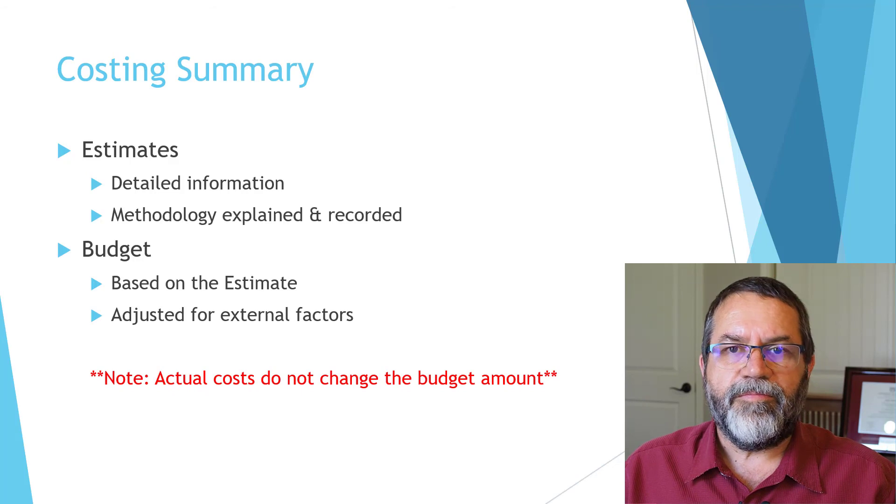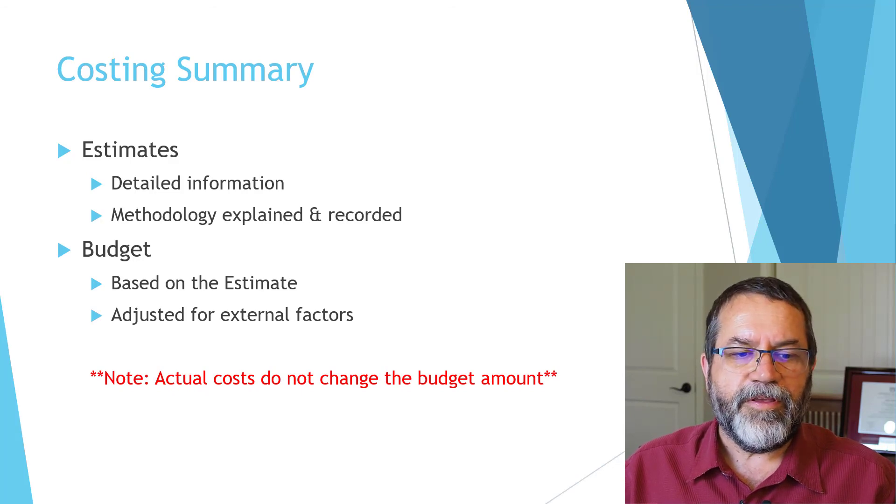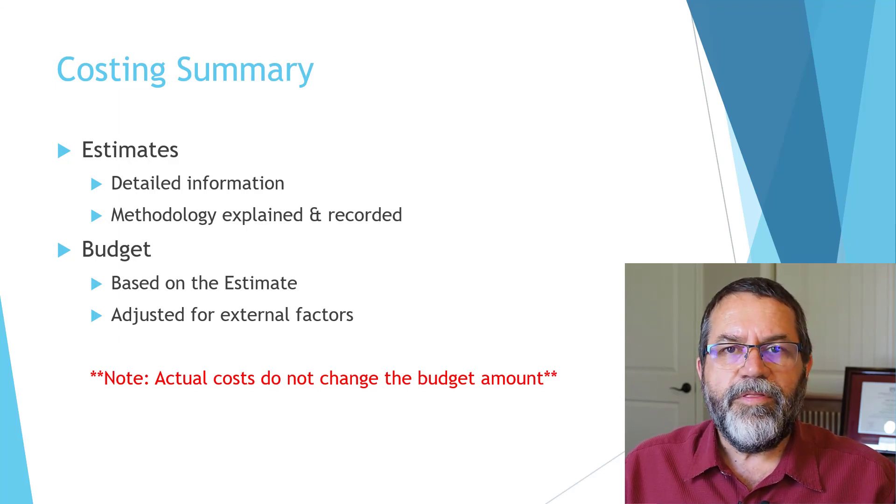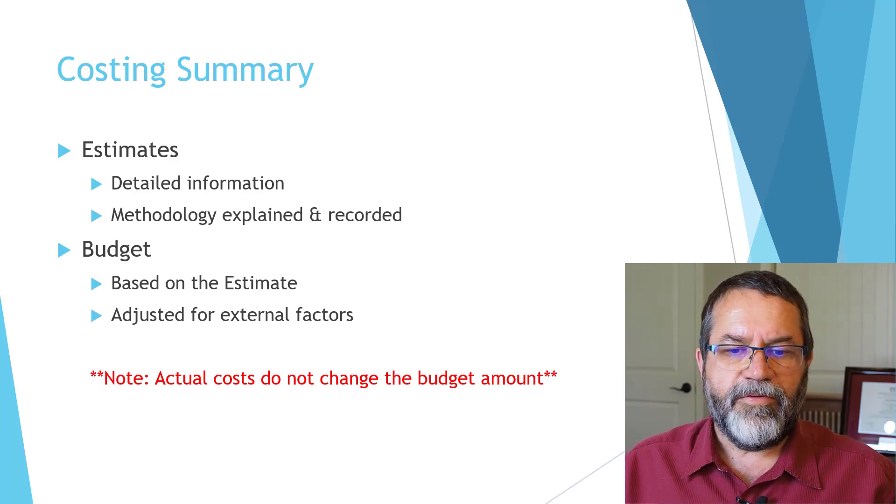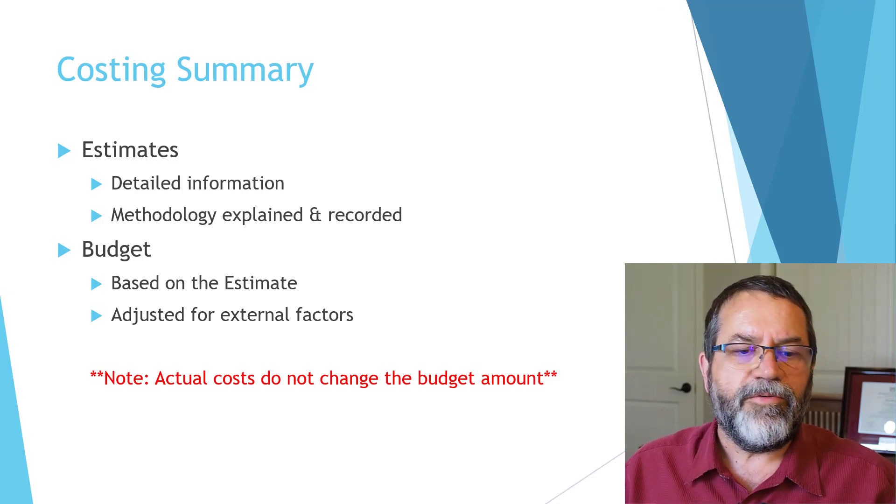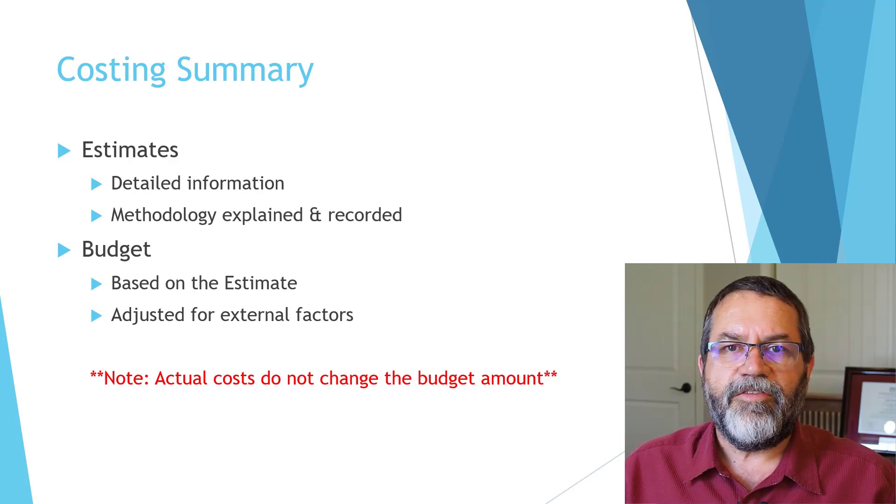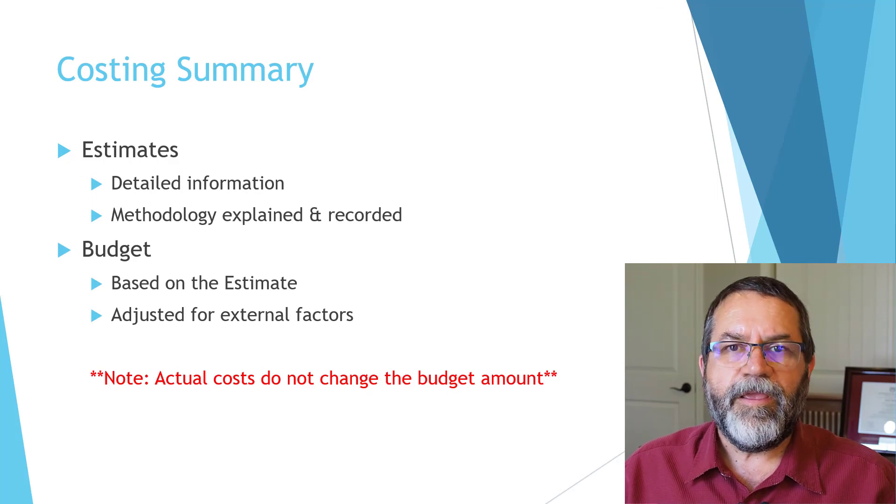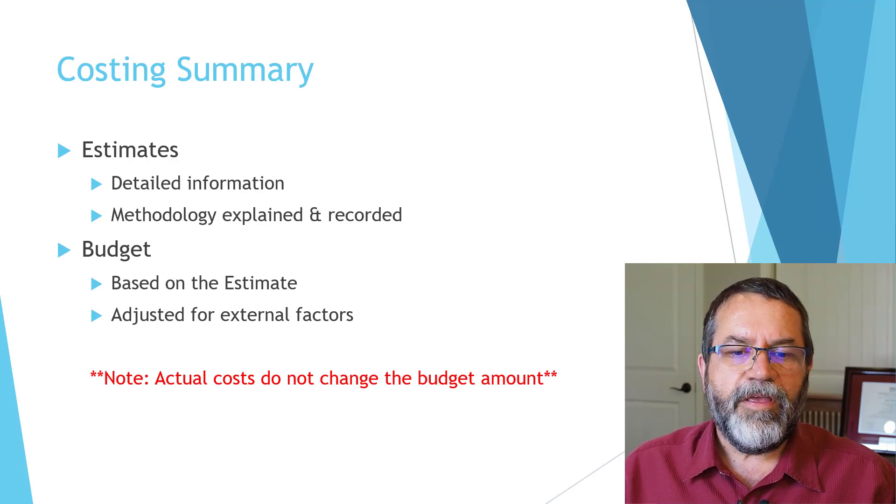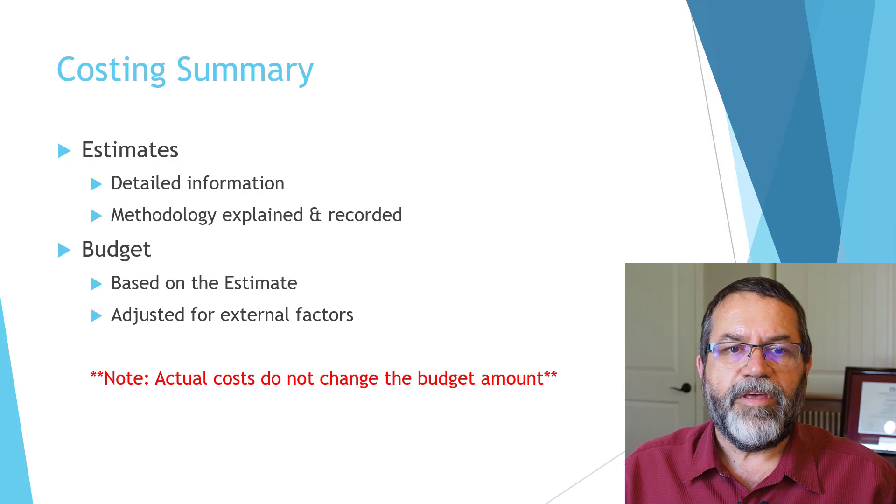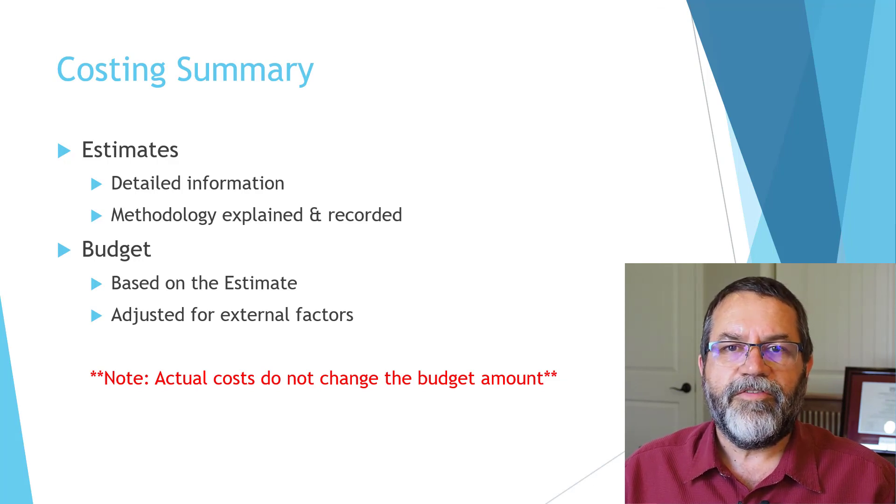One more thing—this is something people use incorrectly very frequently: what is the meaning of budget? Especially if you watch reality TV construction shows, people confuse this. Just because your costs change doesn't change your budget. Your budget is how much was allocated to do the job. Your costs might be different, but your budget is how much you're allowed to spend. Okay, thank you.